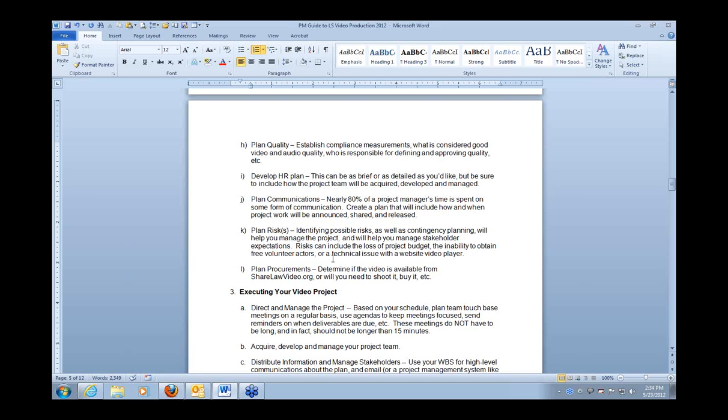Risks aren't an issue until they occur. So you can include a line item for budget in the event the risk does actually occur. That can be a contingency budget. You don't see it that often necessarily, at least on the 2 grants that I've worked on, but it's definitely something that you may want to consider in this type of video project.